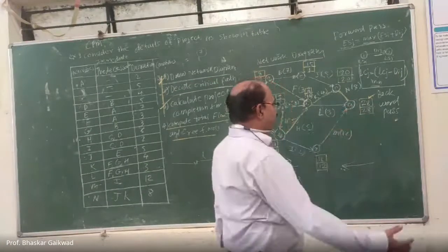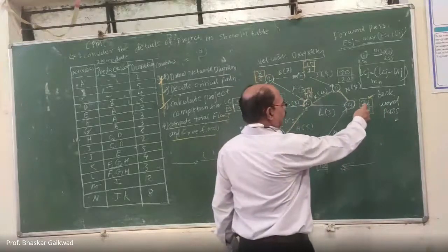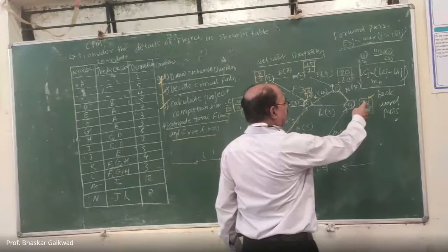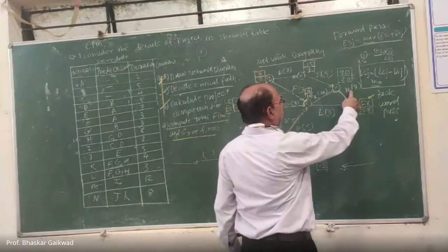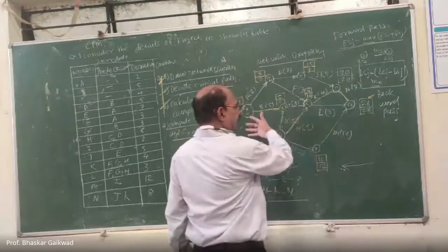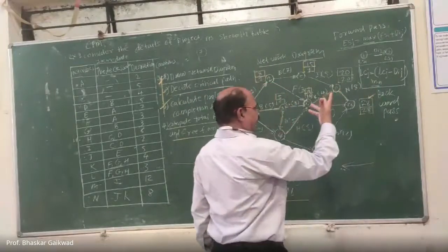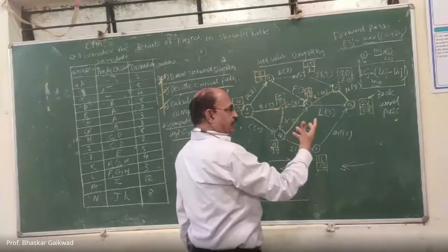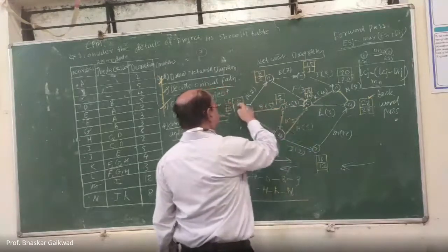And after that, you can go to the backside. These two should be equal. If you want to find this activity, then you subtract this duration, and here you will get it. Similarly, you can go to this side, minus, and this should be the minimum. Means wherever 2 activities are there, you have to select the minimum.